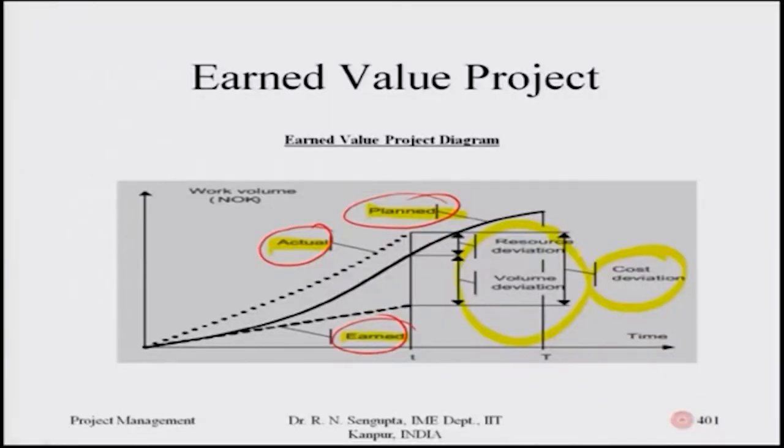If you do not overshoot time, you should get some benefit — if you deliver a project beforehand, you gain something; if you deliver after the deadline, there is a penalty. This negative cost and positive cost should be considered to understand the balance between actual and planned total cost. The earned value project diagram's y-axis can be total cost, cumulative cost, resource allocation utilization, or work volume.